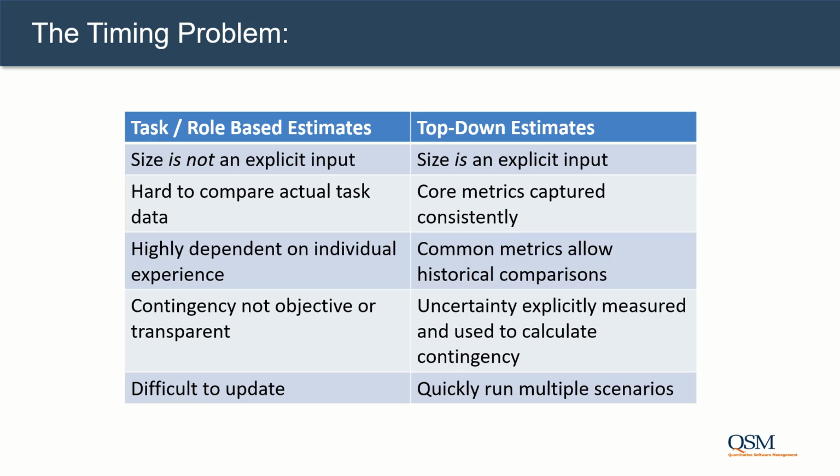For early estimates, detailed task or role-based estimates suffer from a mismatch between the data available and the data required to create the detailed task list and estimate the effort and schedule dependencies between each task. These kinds of estimates are closer to planning than upfront estimation. The high level of detail required makes them difficult to revise and update when the landscape changes.